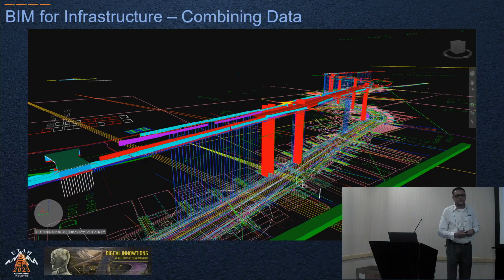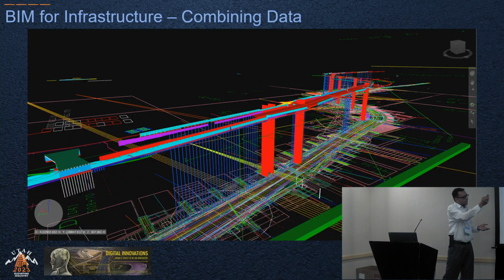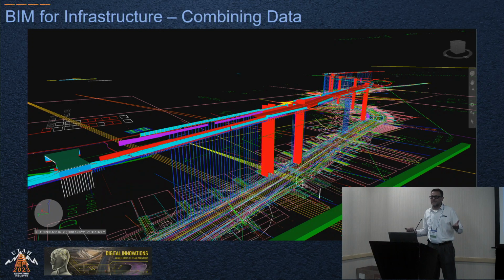It's my favorite project. I've been working on this project now for 4 years. It's a full BIM, it's in Michigan, I-75. Complete rehab, 8-mile stretch. The key focus of all of this rehabilitation, they said they wanted it modeled. So I got a 700-page manual from them saying what they wanted in their model and what the intention was behind utilizing the model. So I had to come up with a strategy for doing that because we also were responsible for the as-built. And when we talk about digital as-builts, everybody says, oh, it's crap, it's nothing, it's not updated. No, this is updated.